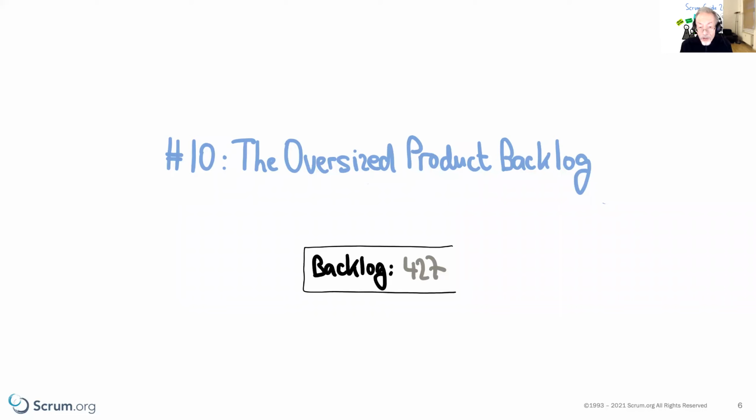So my suggestion always, as a rule of thumb, of course, depending on the context your team is working in, try to limit the size of the product backlog to something worth 3 to 6 sprints. That has been a good average value in my experience. And you simply do so by counting the throughput of the team and then doing the math. And as far as the other product backlog items are concerned, I would suggest to remove them, put them somewhere else.